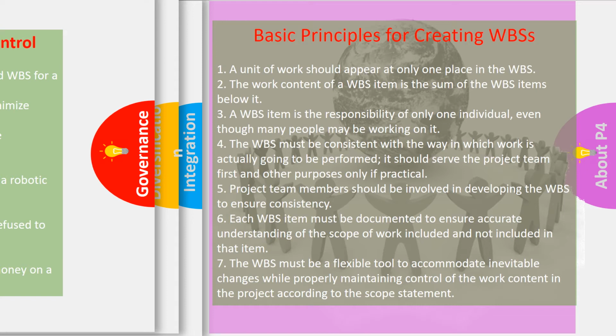Can't stress enough the importance of the work breakdown structure, and breaking it down into its elements and then sections, and then subsections and elements within those sections, and breaking it down into its lowest common denominator, so you can't break it down anymore, so then you can accurately estimate what things are going to cost. And then if you know what things are going to cost and what you're going to buy, then you know possibly how long it will take to get these things.